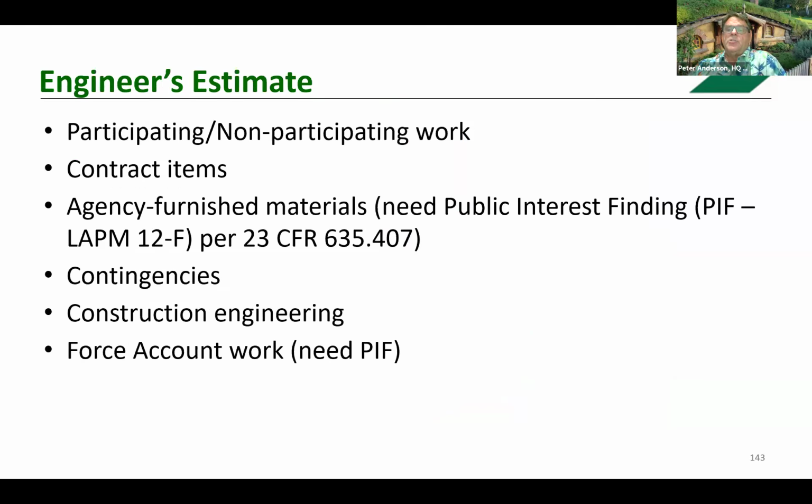The engineer's estimate is used to authorize the construction phase and must reflect the anticipated costs of the project in sufficient detail. It is to be broken down to segregate participating and non-participating costs. Non-participating costs are typically work ineligible for federal funding for various reasons, such as a utility that's not federally eligible. The estimate needs to be broken down into individual contract items.